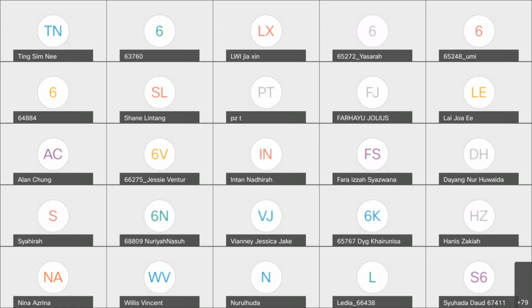And of course, you need to input materials, right? Like I said, I have a material. Later on, I'll also post that Excel file into Elite. You will see that I have a breakup on material, and in all the different sheets that I've shown you just now, they actually put material first, because material should come first, because that will indicate the quantity of work. The quantity of work will be associated with material directly. And then production rate later on for machineries.